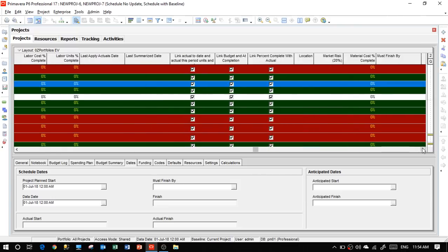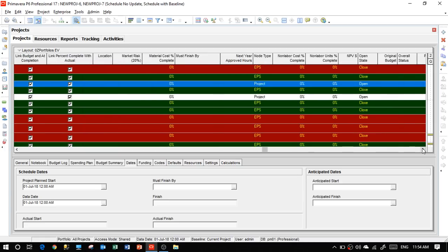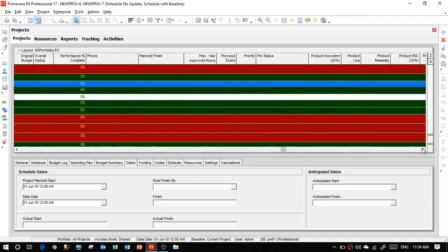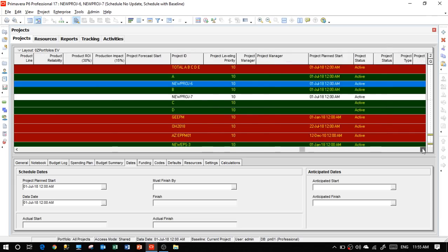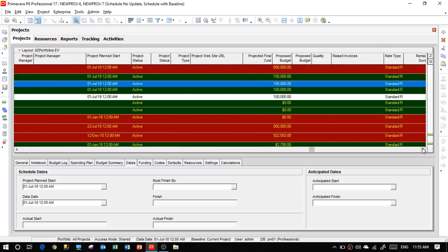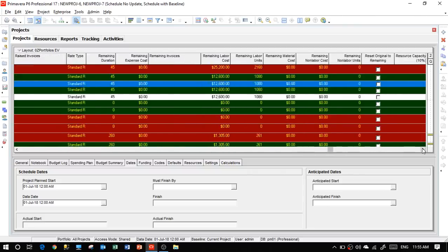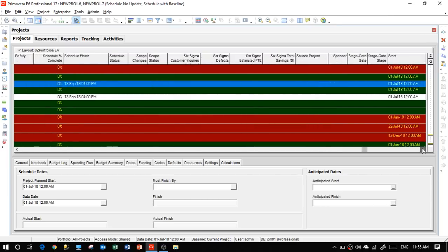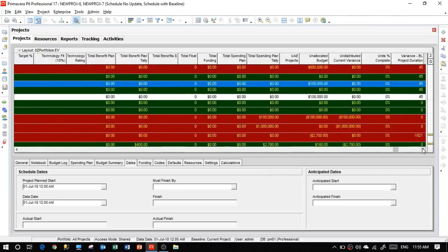Okay, so in the second project, you fix the baseline schedule. That's the baseline. And the first one compares itself with itself. So whatever you change, it's still considered a baseline for the project. So it will not really show you a change or a deviation to the baseline, because there is no baseline really assigned, but it considers itself as a baseline. So if you see this one, this is the first outcome of this comparison when we do portfolio management and we check the data in the EPS view.